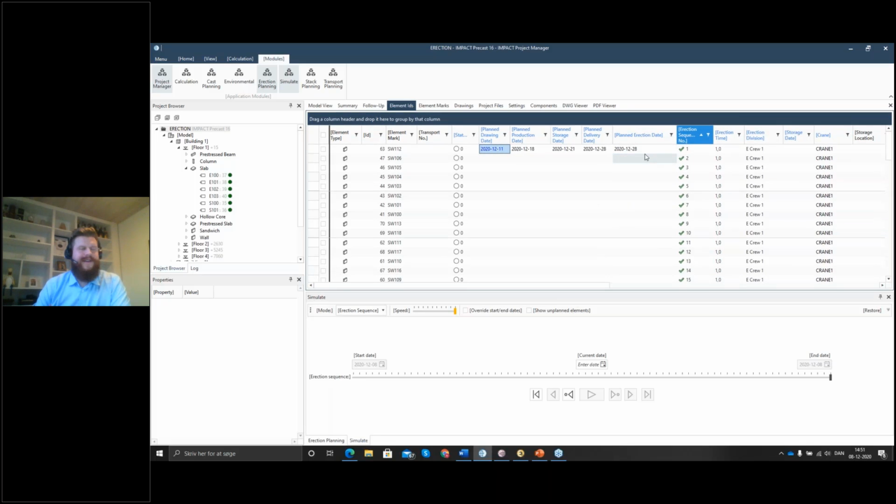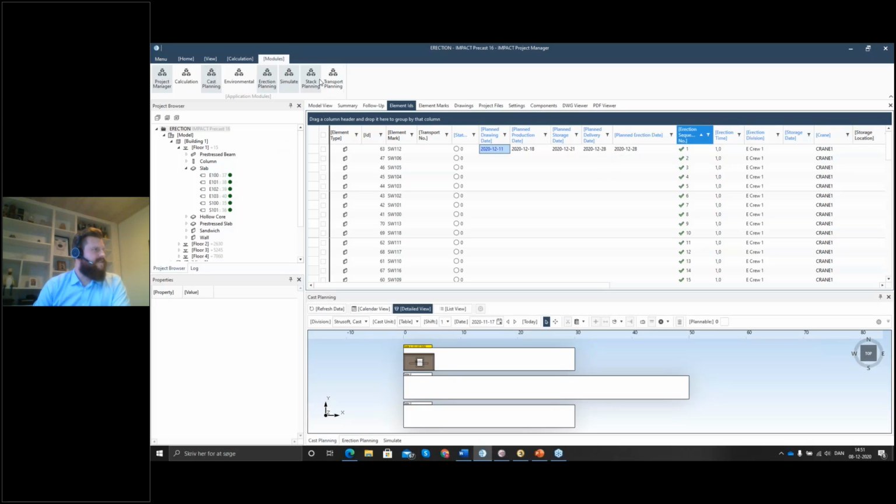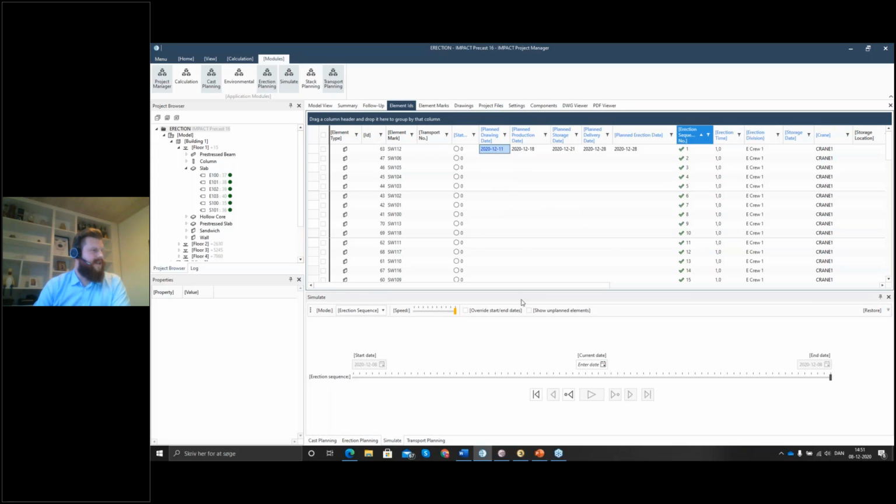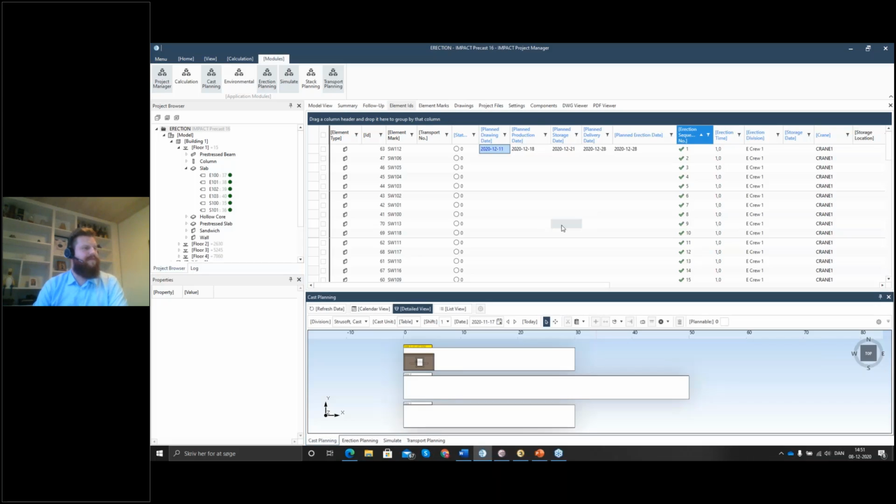And it'll say you can't erect it before that date. And of course, this is just the dependencies. You can always go with the no. You can always select you don't want a warning as well. And once you've done it the first time, you can also switch it off. So this is for our rough planning, of course. So this gets us into a little bit of the actual production planning as well of this webinar. This is like 1 minute or something like that.